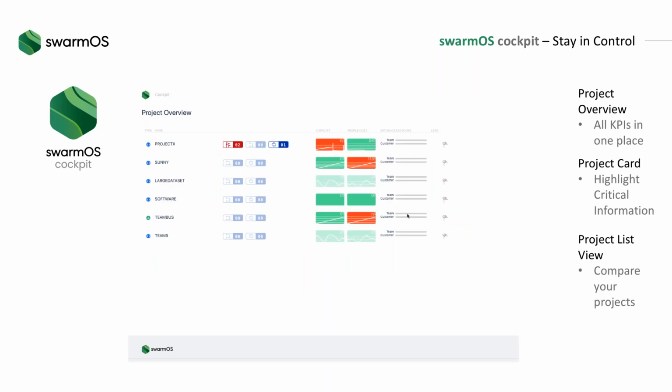You can switch to list view, which allows you to see which projects, for example, are short on capacity, which is the column over here. You can see one red project. You can obviously drag and drop those projects. But actually, if you say, well, project X is red on capacity, actually, it's not my most important project, or I have another project which I intend to drop and I have a good team on this project, which actually has the capability to work on project X. You can actually see this from here and say, okay, let me drop a project here or reduce capacity and actually put more capacity on project X, which then allows me to actually meet my deadline.